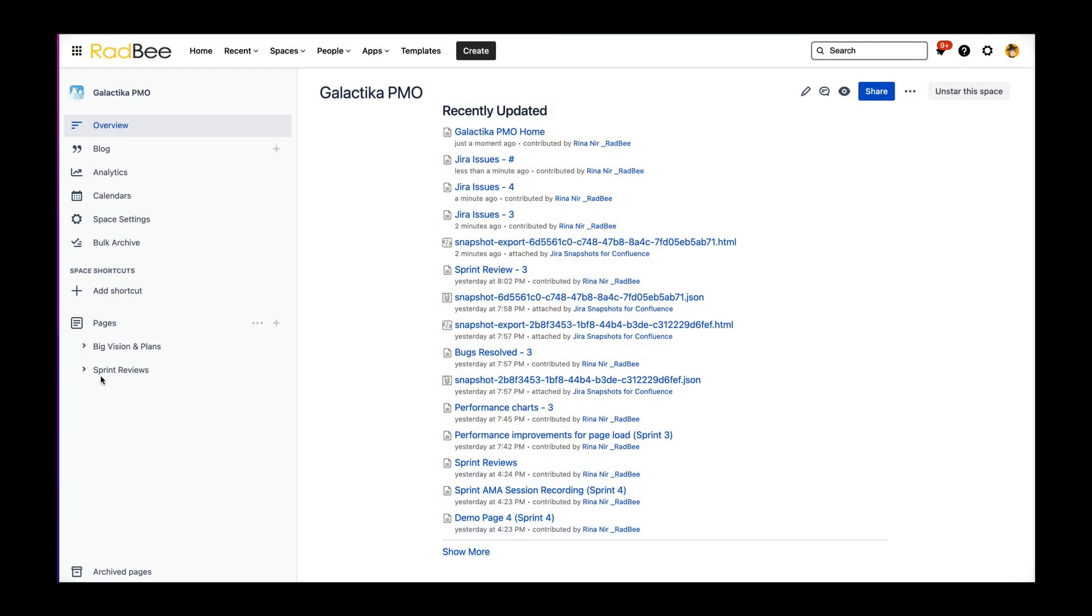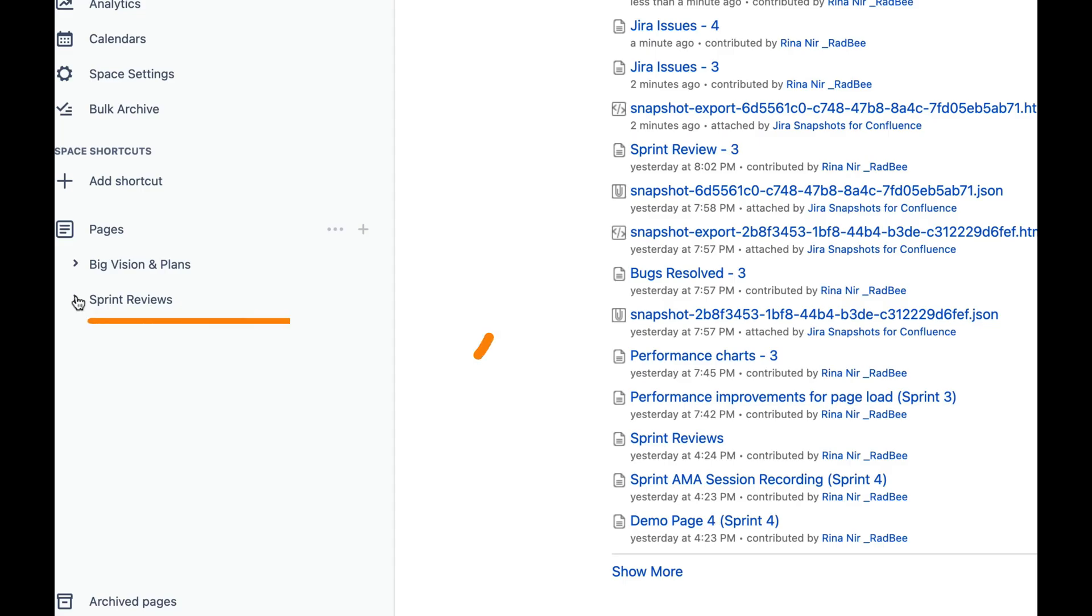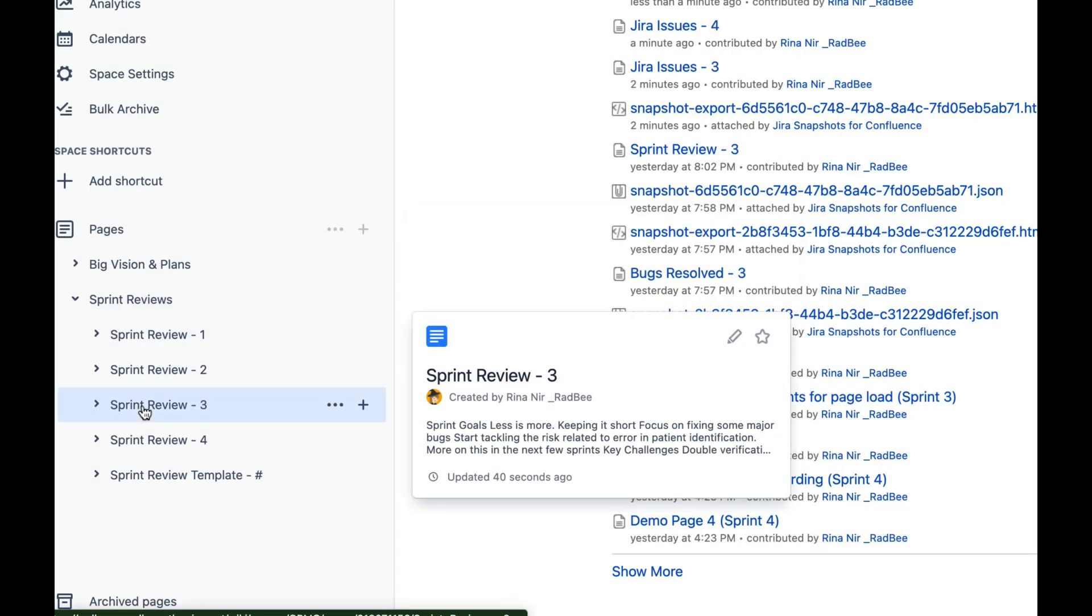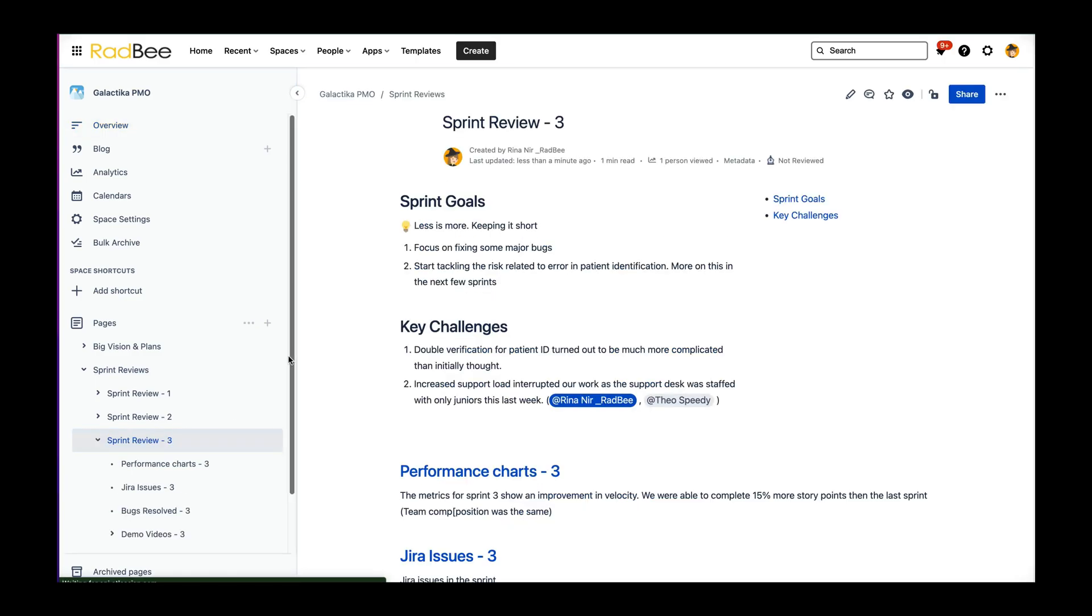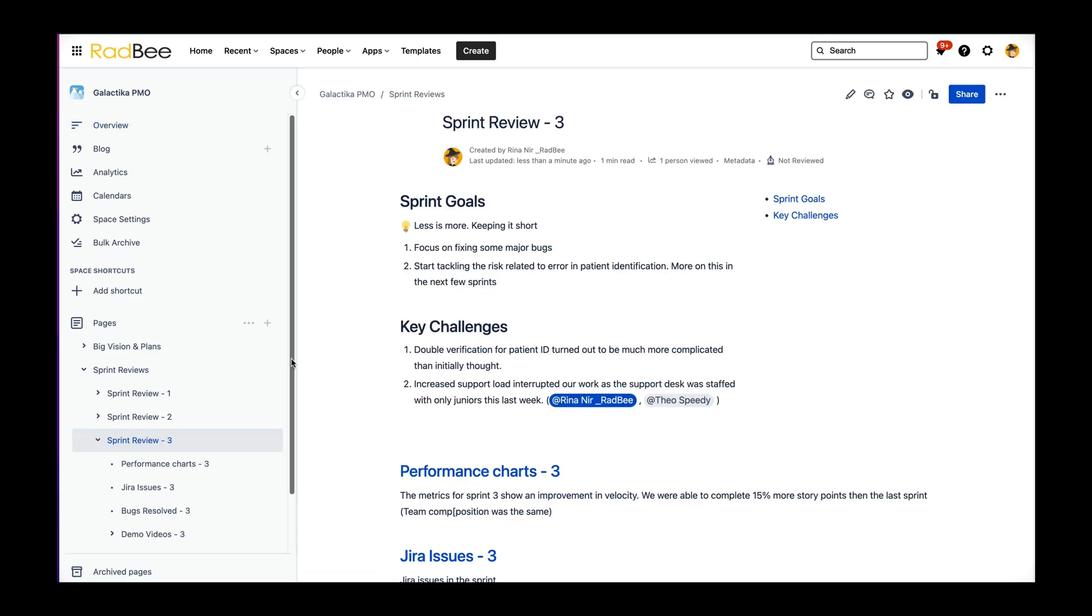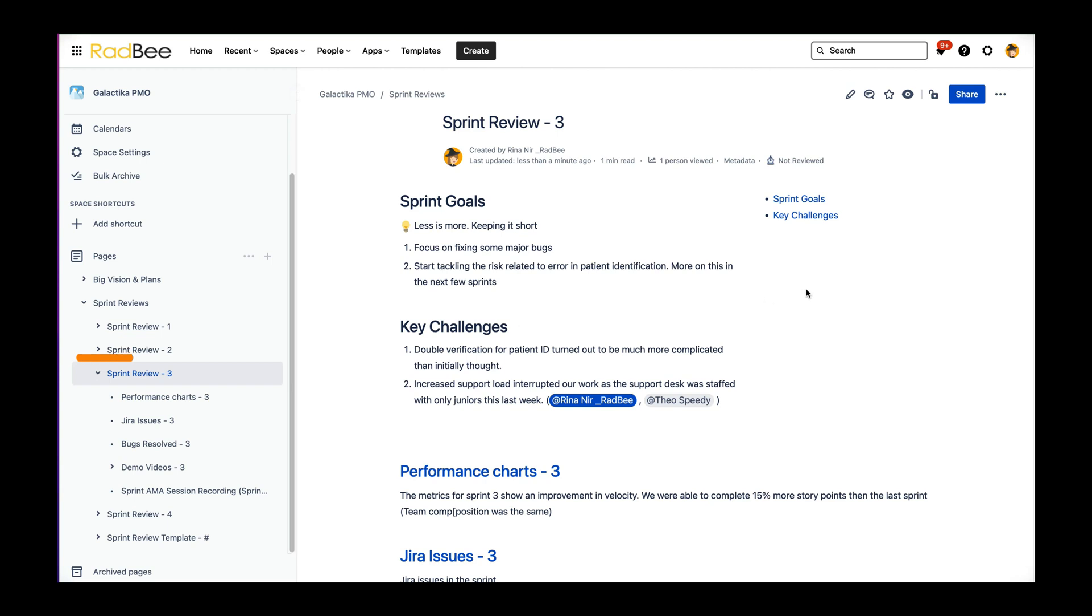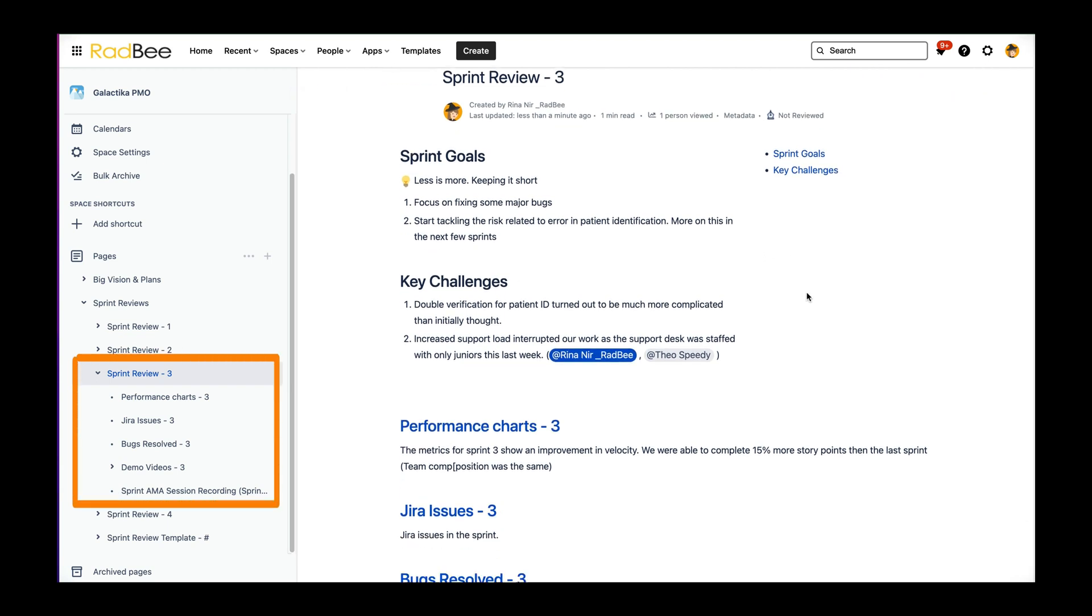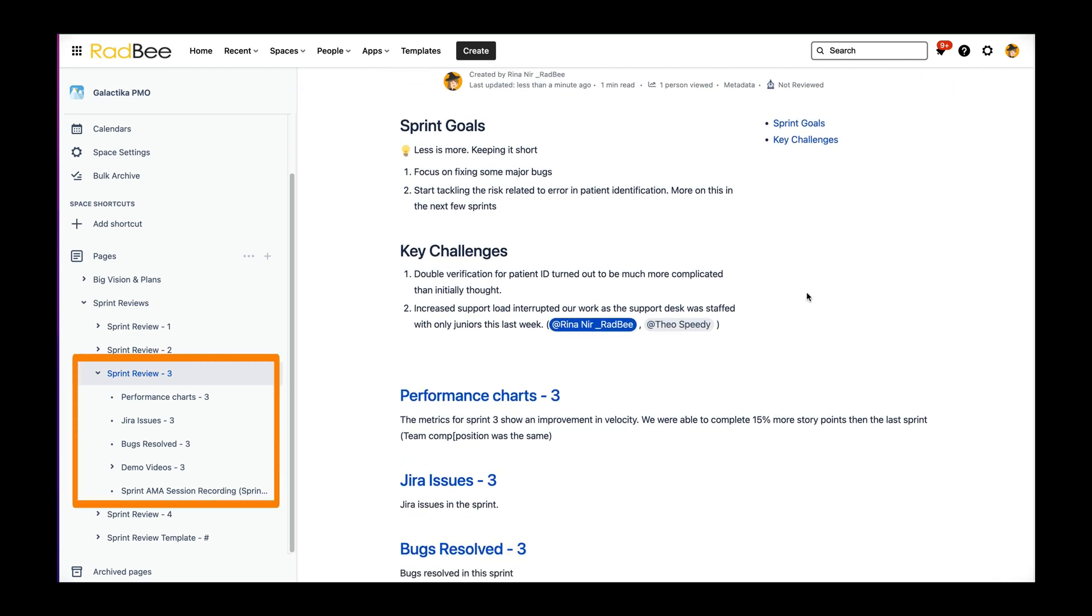This is how we set our Confluence to make our sprint reviews better. There is a designated area for the review and a consistent way to how the data is presented. Sprint goals, challenges, performance data, and all the rest are ready when the sprint closes.